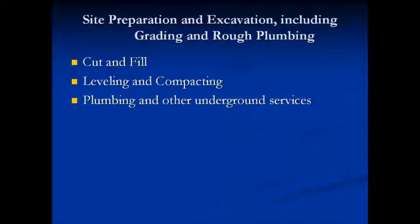Site preparation and excavation, including grading and rough plumbing, would include things like: does the land need to be cut away, or does it need to be filled in to accomplish whatever needs there are for the building? Does the soil need to be compacted more, and is it level for the uses that it's going to need? Is it sloping properly? Are there barriers in place — like barriers to prevent weeds from growing if you're going to have a paved sidewalk with decomposed granite? Plumbing and other underground services — are those in place?